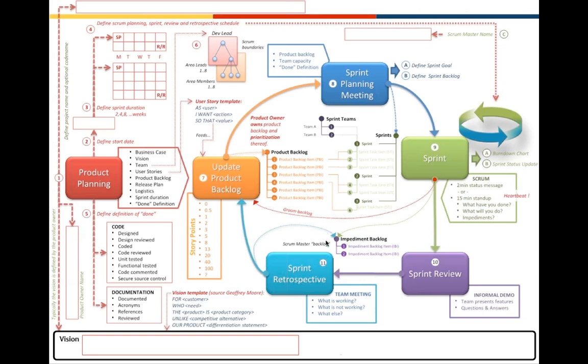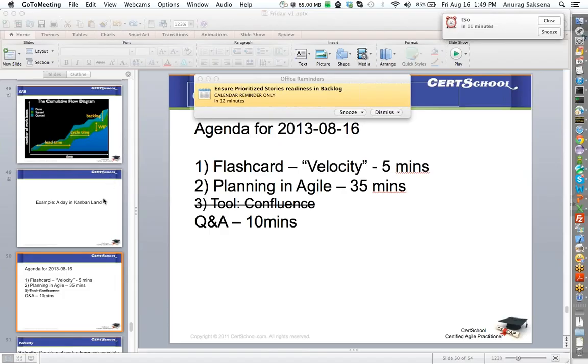If 5 sprints are going into one release, you may not be able to park all the stories in all 5 sprints, because then you lose that flexibility of changing things in the backlog, reprioritizing things in the backlog. But you want to start parking stories in sprint 2 and sprint 3 while you are still working in sprint 1. Hopefully that answers that question.